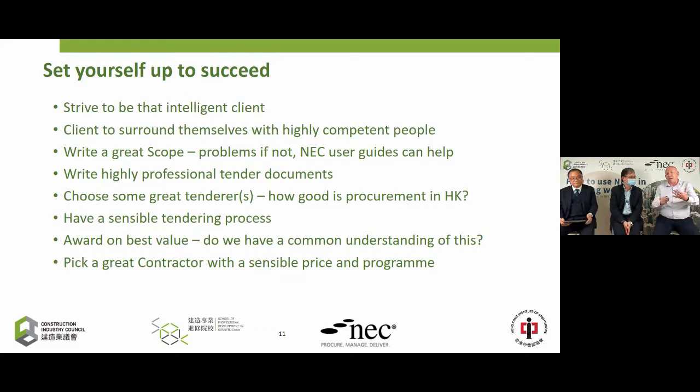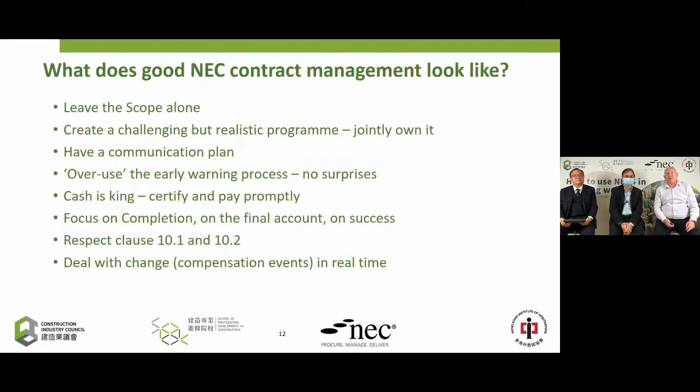So I did read about, I'm not sure if it will ever happen, a government abandoning the lowest bid. If there were 5 tenderers, throw the lowest one in the bin, throw the highest one in the bin, look at the middle 3, find the medium, that's the right contractor. Who's brave enough to do that? Who's our intelligent client brave enough to do that?